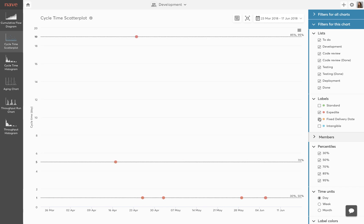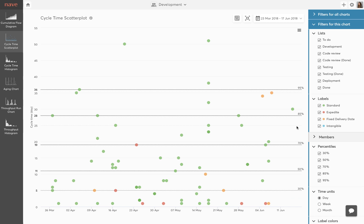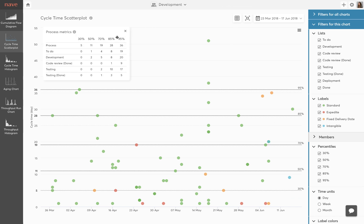Finally, you can make use of our advanced process metrics at the top of your graph. This summary allows you to see your cycle times and probabilities for each process state at a glance. For example, we can see that 85% of our tasks have spent less than 8 days in development and less than 10 days in testing.